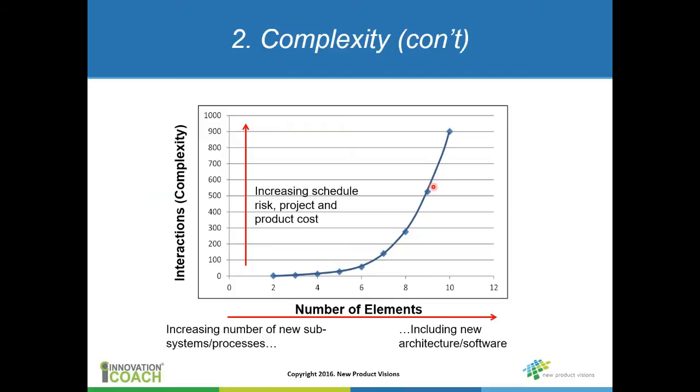And I think how that plays out in projects, in my experience anyway, with electromechanical type systems that also include software within the overall system, as you increase the number of new systems within your development and then layer on top of that all new software, both embedded and upper level, that interacts with all of the subsystems, the complexity really goes up. And as the complexity goes up, in my experience, the risk on the schedule goes up.